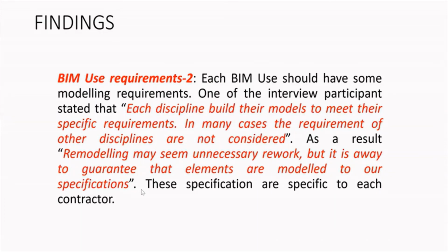The second theme we found was the BIM use requirements. Each BIM use should have a specific modeling requirement, and one of the interviewees stated that each discipline builds its models to meet its own specific requirements. In many cases, the requirements of other disciplines are not considered; it's not their problem. As a result, others will have to remodel, and this leads to unnecessary rework. But they said that the remodeling, which may seem unnecessary to other people, guarantees that the elements they remodeled meet their own specifications. So they're confident with the model.